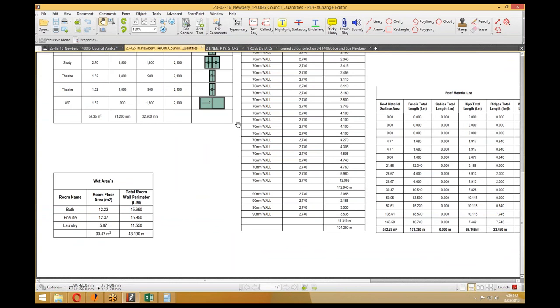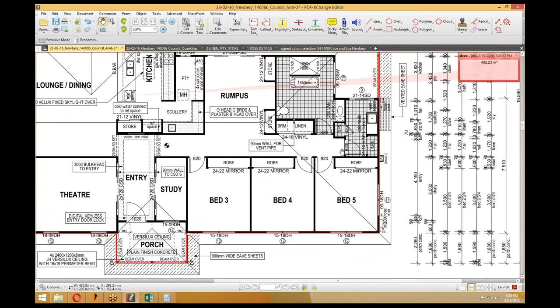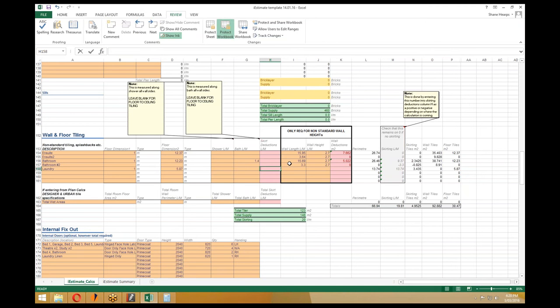There is a skirting deduction at the doorway, and so that linen hasn't been measured, so you wouldn't take that one out because the perimeter that they've picked up is the external perimeter. So you wouldn't take out this one here or that one there. There would be a skirting tile that runs out and around. So we would just take out the 0.82.